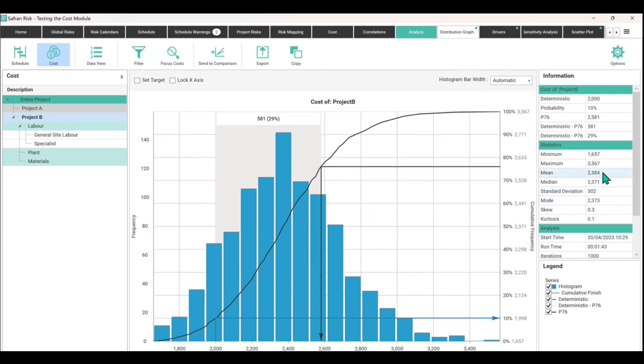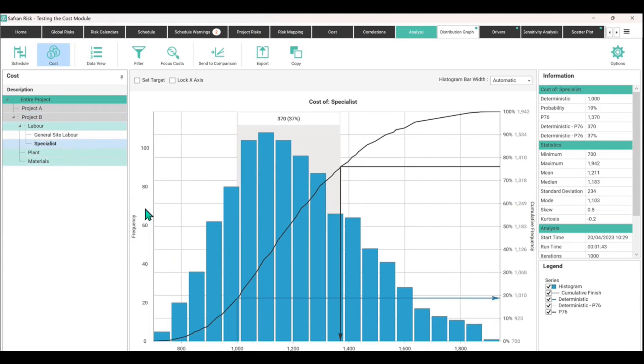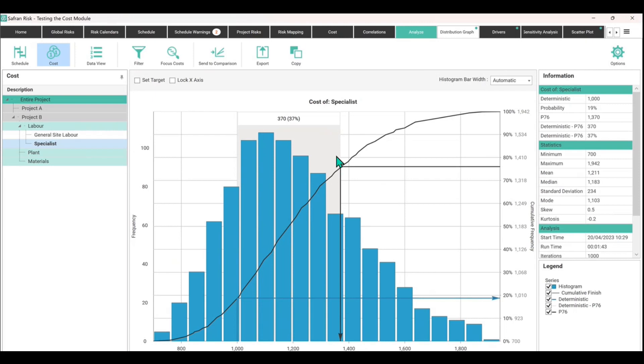You can't do it with P-values. That is just for a statistical understanding of how confident can you be that any given piece of this jigsaw puzzle will cost up to the P80, say, of 1410. What this actually means is that you are finding 80 percent of all the iterations out of a thousand iterations that we randomized through the Monte Carlo are going to fall somewhere between zero, this lowest value which was the minimum of 700, so somewhere between 700 and 1410.